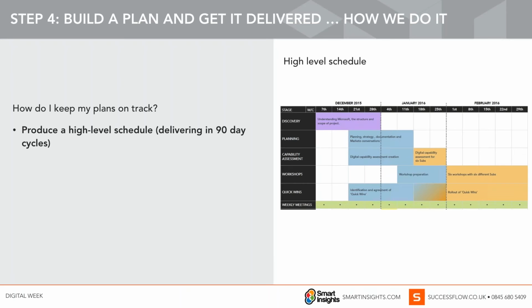So very quickly, because time is pressing, but the most important thing really, and Steve mentioned it earlier on, is these 90-day cycles and being able to give yourself an ability to deliver something within that 90 days. So yes, there'll be a lot of things that you need to work in terms of planning. You might need to do some discovery, but also identify things that you can deliver within that first 90 days. They may be small, some of the quick wins. Having that 90-day schedule will help you focus on delivering something in chunks, making sure that you can deliver, but also then foresight.